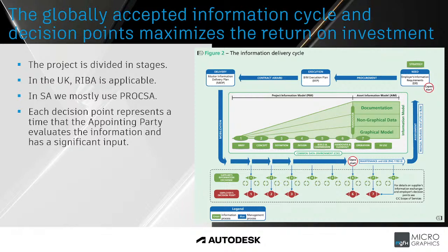Best practice states then that you should actually restart with another employer's information request or exchange information request, because you're in essence overstepping your boundaries and asking the supply chain to do more work than what was agreed to benefit yourself, right? So we should also recognize that we as owners, I'm living myself into your role, we should also have a responsibility to make sure that we give maximum input by the definition stage.